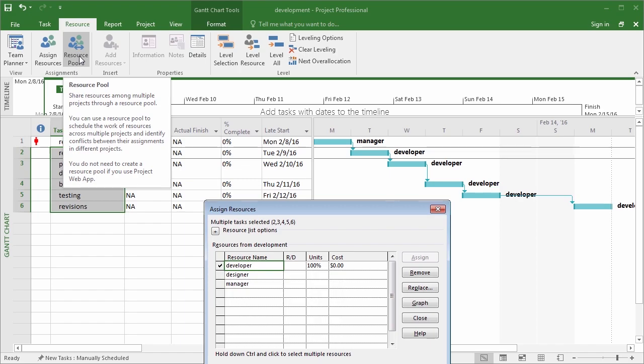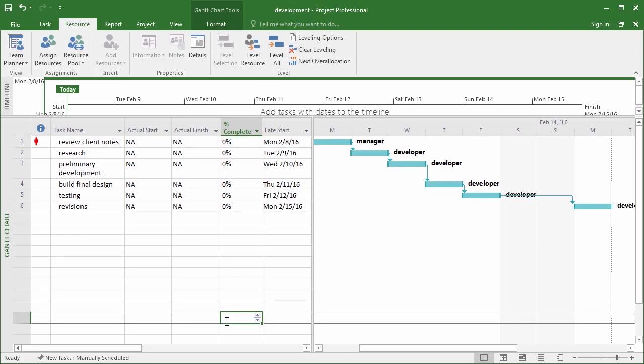Useful, isn't it? Now, in our last module, we saw that projects can share a resource pool. But in reality, often different projects affect each other. So normally you'd have to make one great big long project out of them that might end up being thousands of lines long, and that's no fun. So instead what we'll do is we'll make a master project. So the projects still exist on their own, but they also exist in the master project. And if one changes, the other changes as well. It's pretty easy to do.